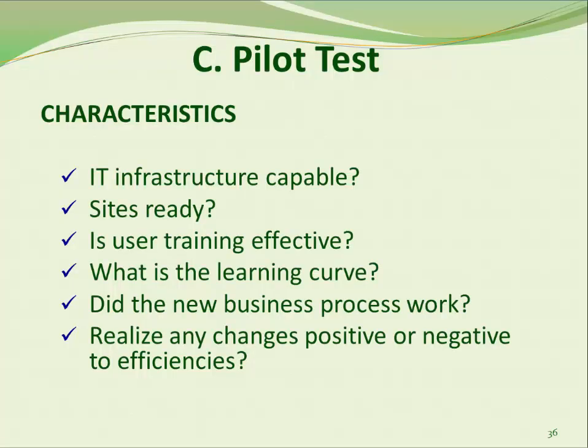Pilot testing will also help you answer some of these questions. Is the IT infrastructure able to handle the new system? Were the sites ready? Is user training effective? What is the learning curve? Do the new business processes work? Did you realize any changes, positive or negative, to efficiencies? Normally, the pilot test involves parallel processing of data through the current and the pilot system, then comparing the results. States should work to resolve any discrepancies found at this point.